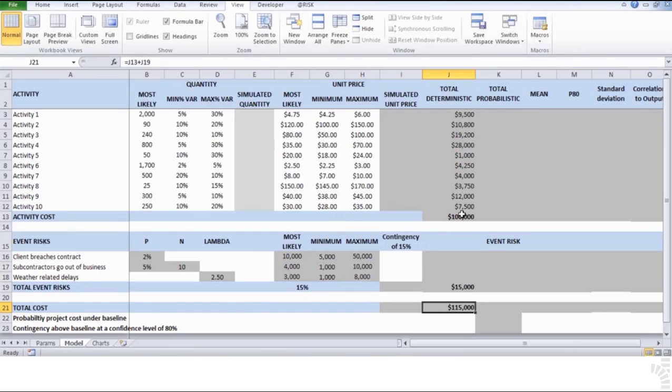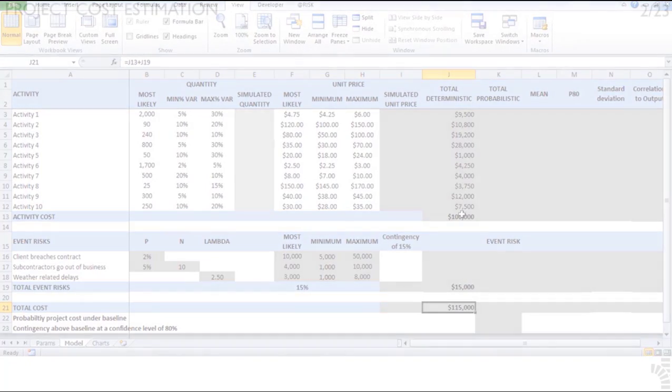$100,000 on the activity cost estimate plus $15,000 as a contingency reserve. As stated before, this first method for determining cost baseline does not tell us anything about the nature, let alone the probability, of the additional risks entailed in the project. The next method, EMV, should give us some light on how additional event risks might be considered into contingency estimation. First, though, we need to know a little about the nature of these 3 risks that we will add.